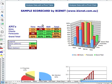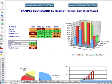These bright red cells, we can see here, means that they're performing poorly. And it basically means that in that first intro task, we've spent more money than we should have. And in the forecast, we've spent more time on it than perhaps we should have. And over here, we see a 3D column chart showing us that same information.